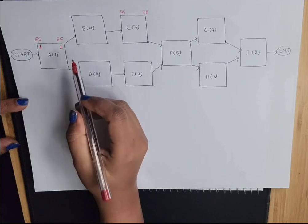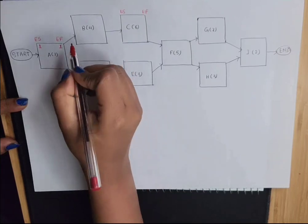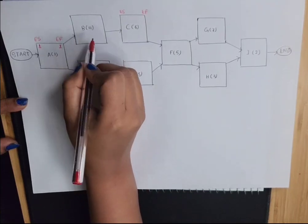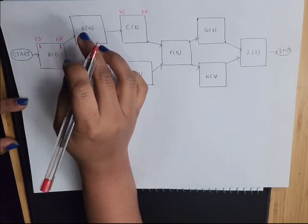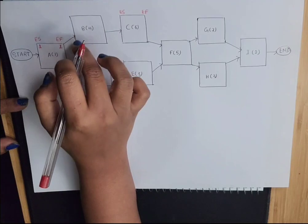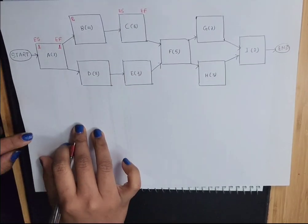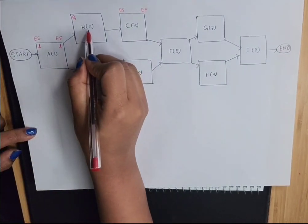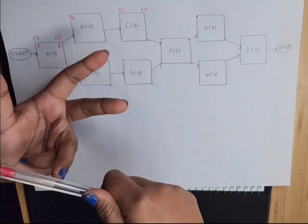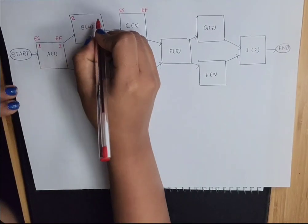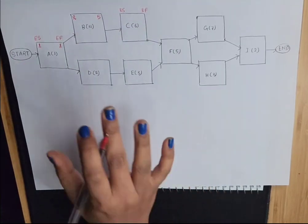After completion of activity A, we have two activities: B and D. Activity B will start once A is completed. Since activity A is completed on day one, activity B will start on day two. This activity takes four days to complete, so day two, three, four, five — it is going to complete on day five.